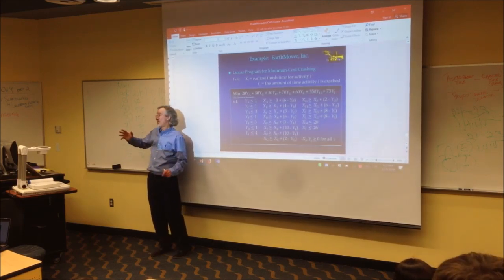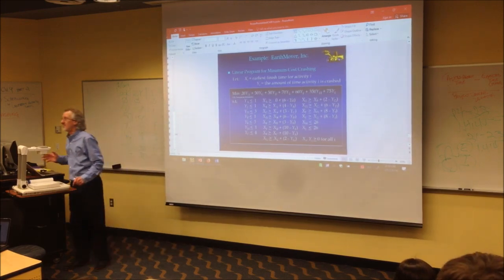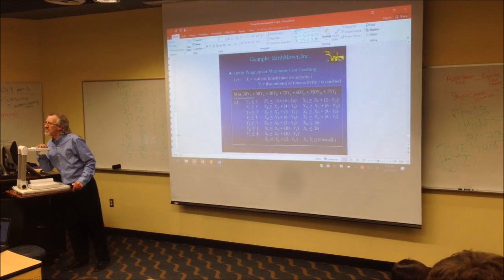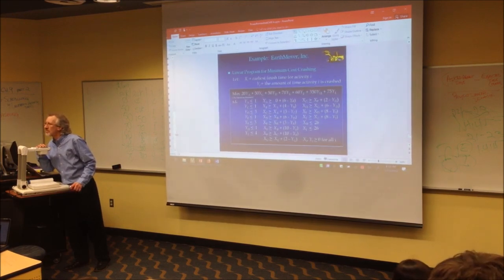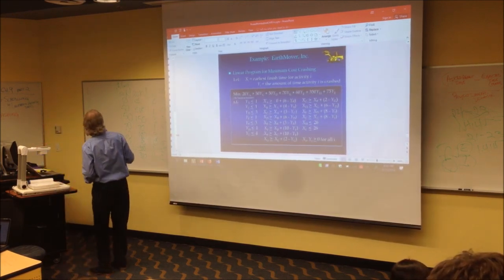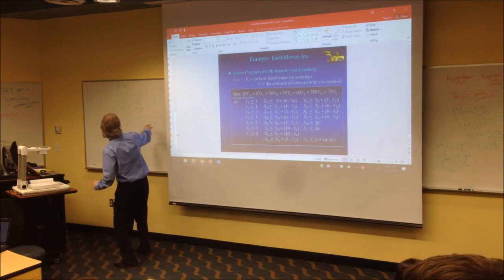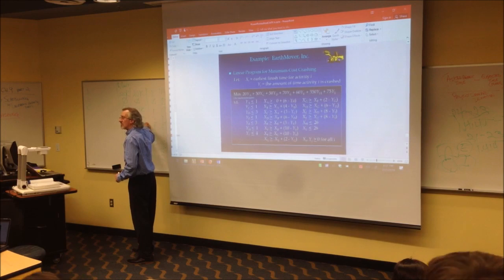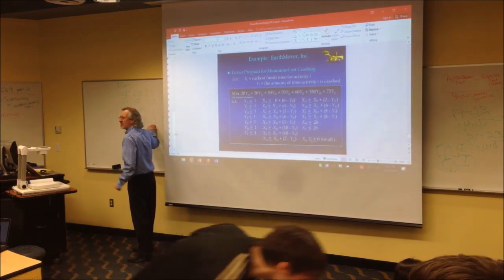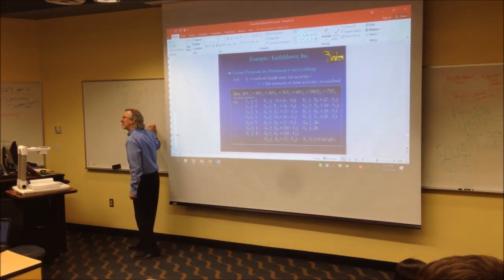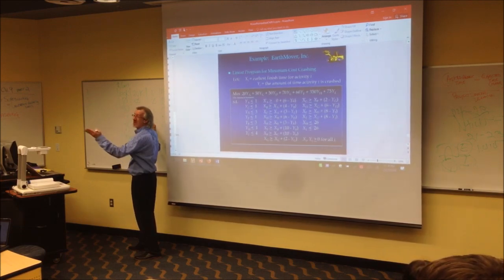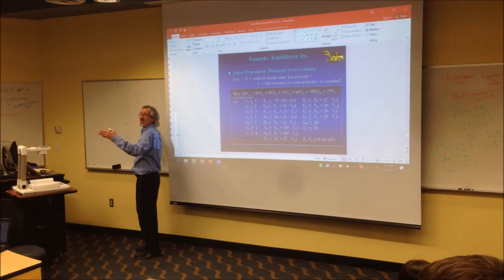Objective function's easy. Y constraints are easy. Correct? Go ahead, Chuck. So this only works if it's proportionate per unit of time that you're crashing. What do you mean by proportion to unit time? So, for example, you have D, and you have $150,000 that they want for crashing in 3 days, 3 units of time, whatever it is. So what if they have an increasing amount, depending on how much you want to crash? Oh, yeah, you're right. The value increases. You see what he's saying there?